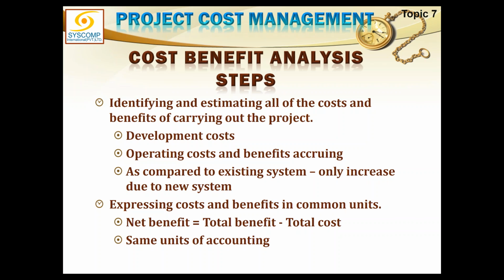Moreover, you could also have a way of doing it where you give some weightage to all these three kinds of assessment. Maybe in your organization, you have decided that 50% weightage will be given to the strategy, 20% weightage to the technical, and 30% weightage is carried by the financial or economic assessment. So yes, you can decide this kind of thing, and that would create a balance. But whatsoever it is, cost benefit analysis is about the cost.